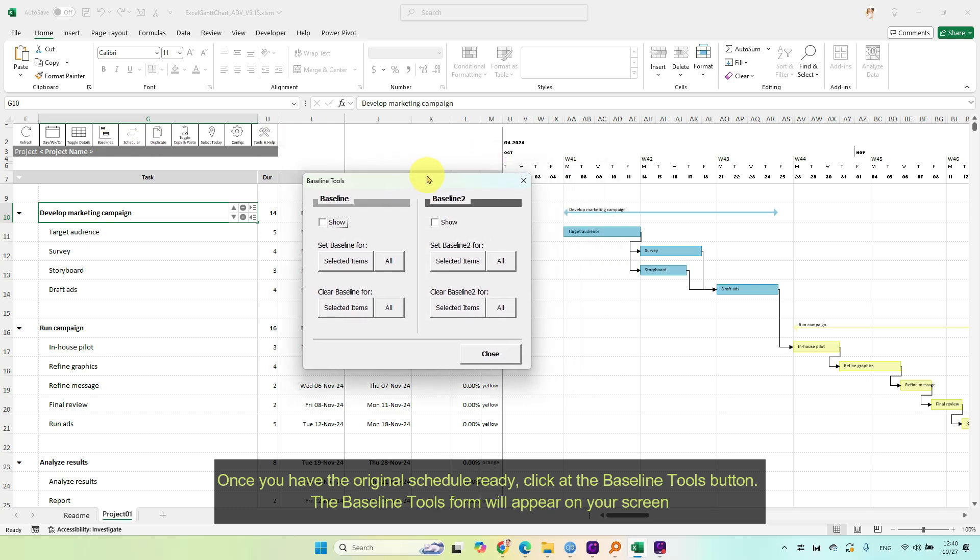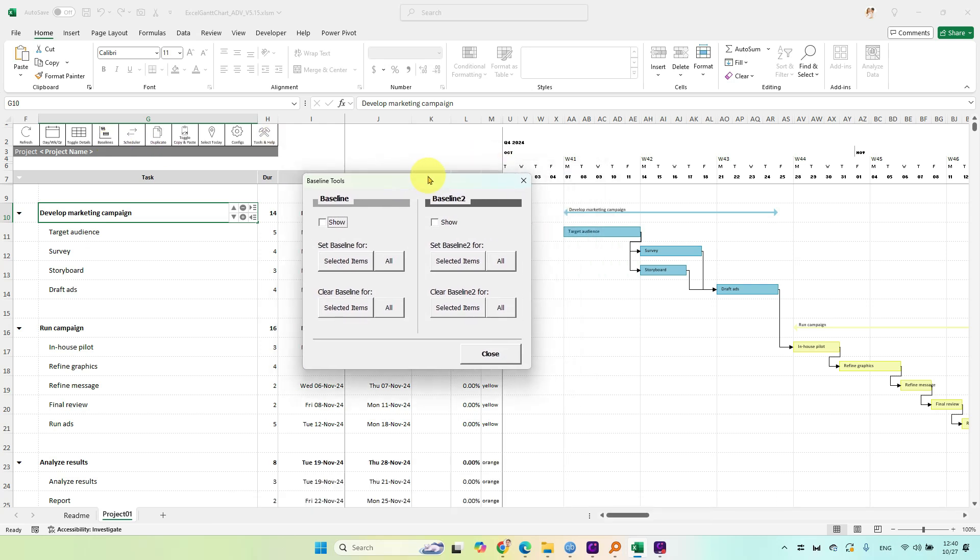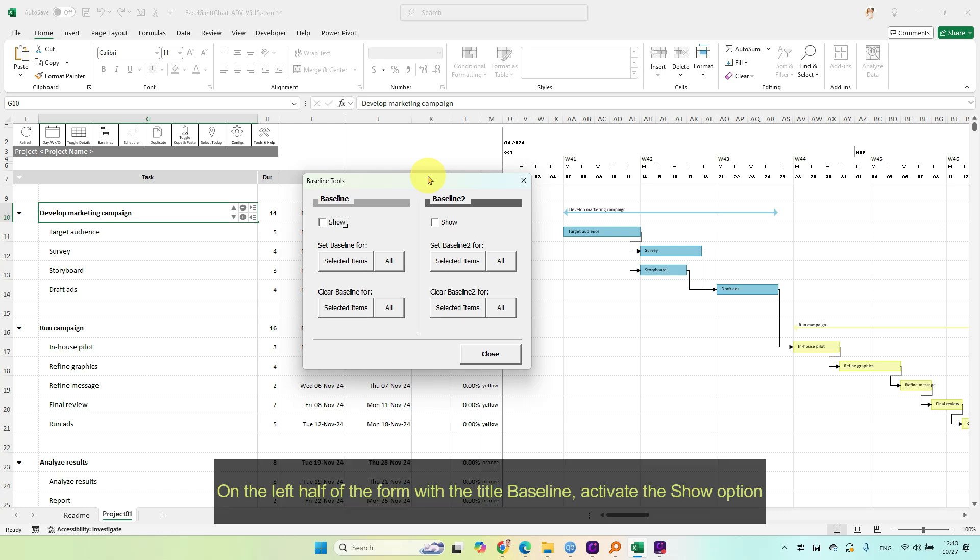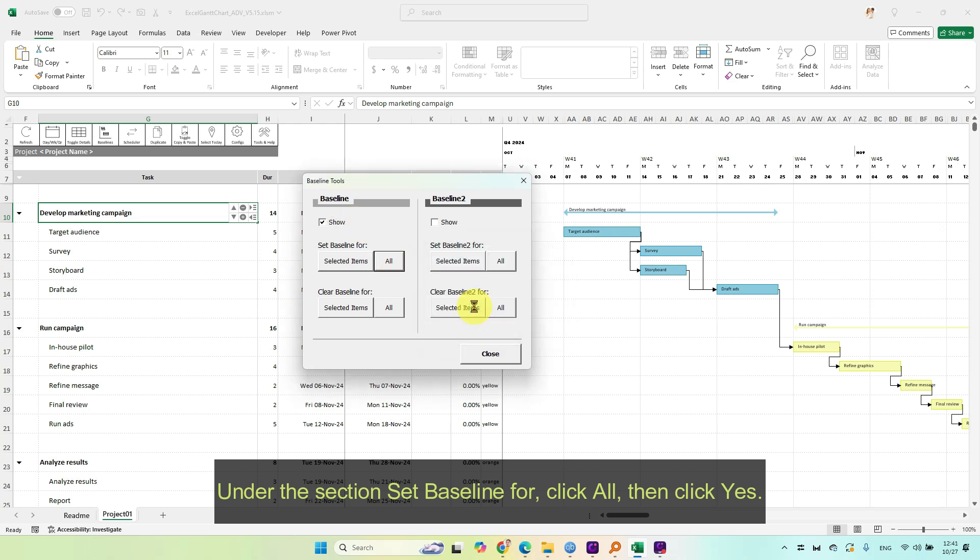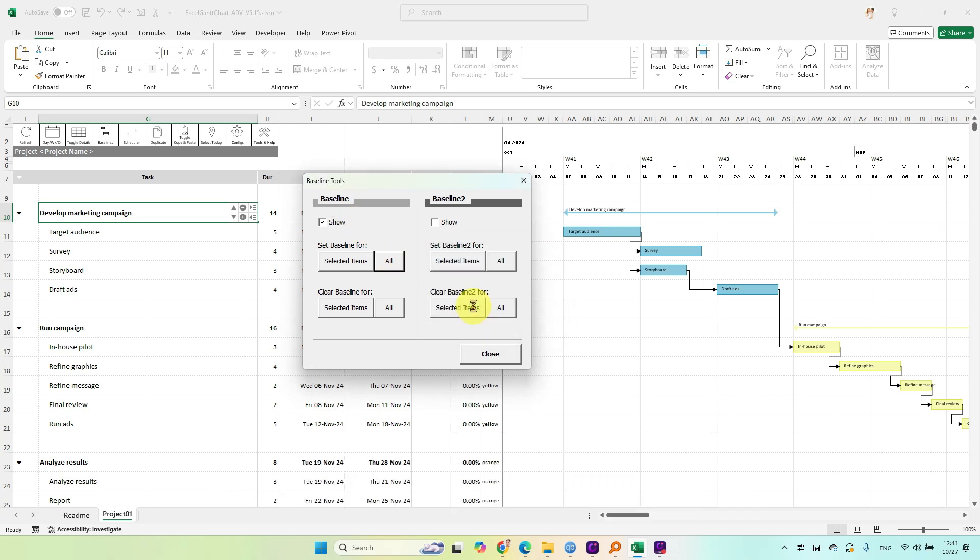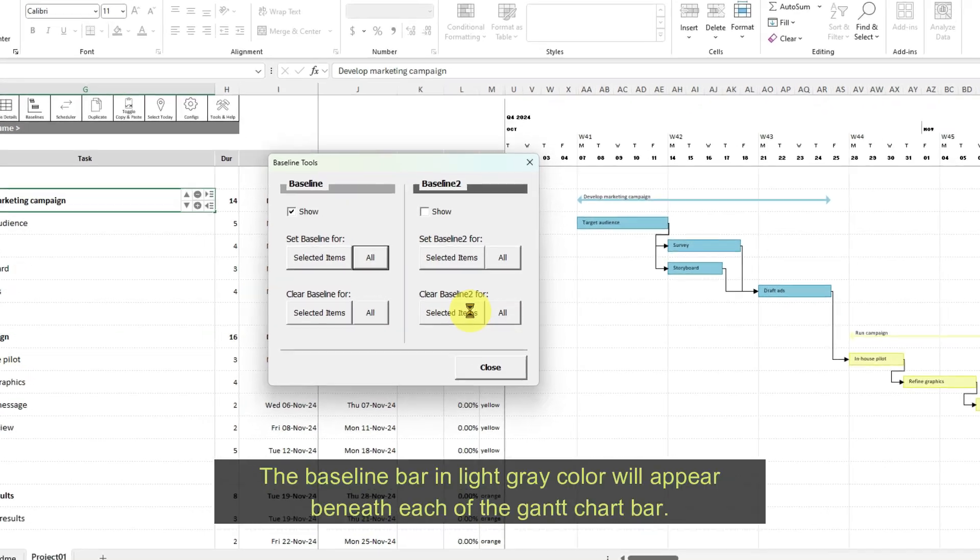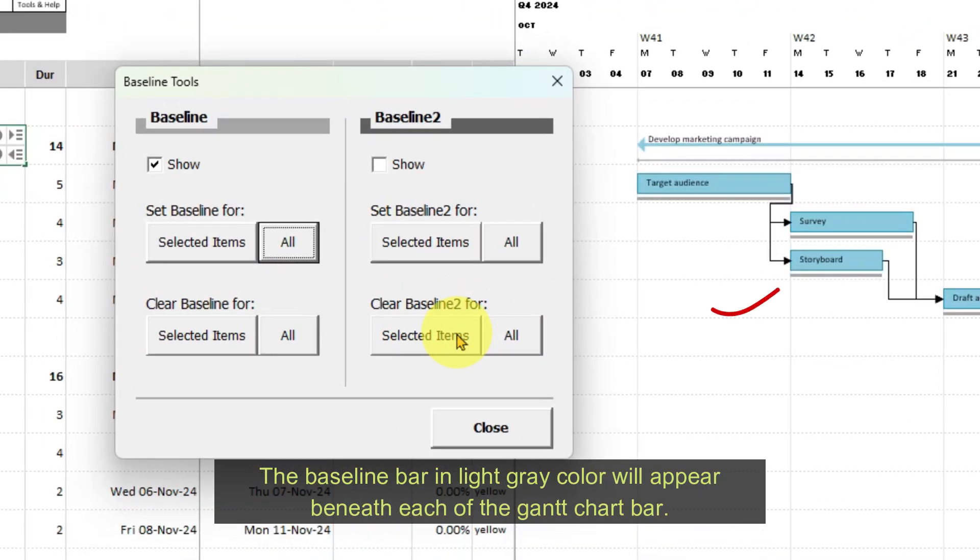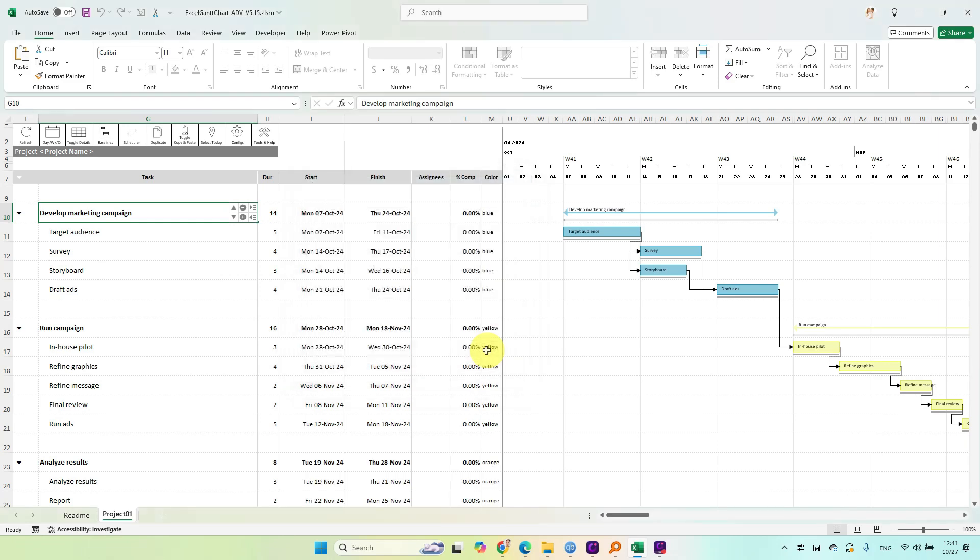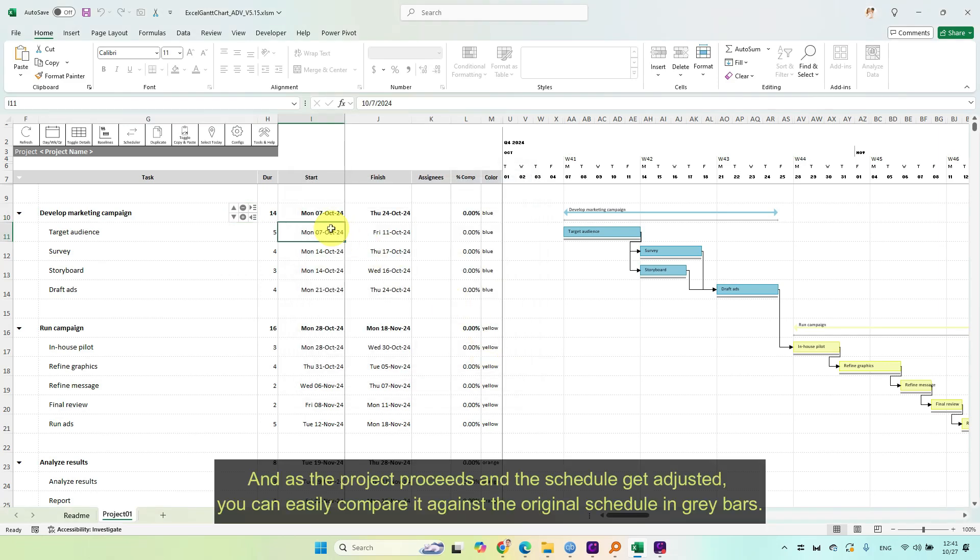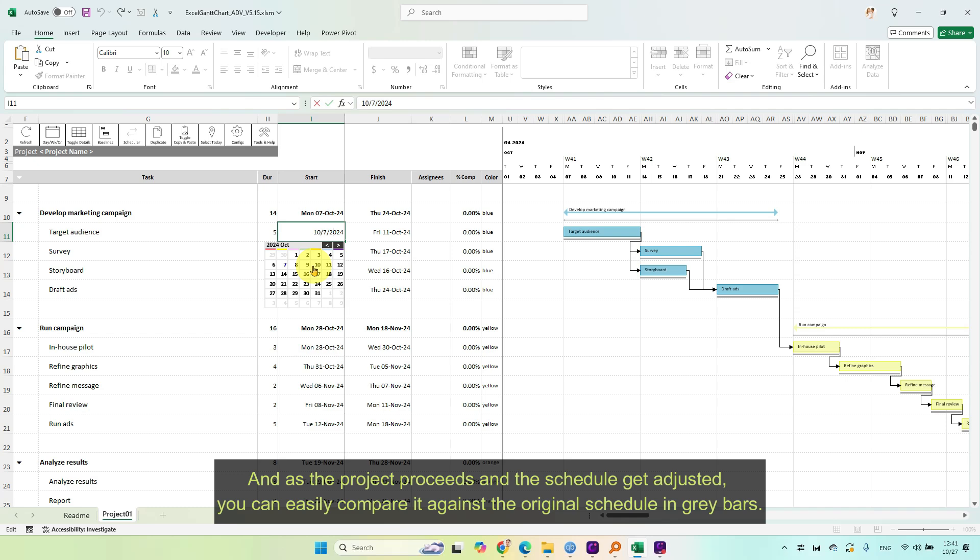The baseline tools form will appear on your screen. On the left half of the form with the title baseline, activate the show option. Under the section set baseline for, click all, then click yes. The baseline bar in light gray color will appear beneath each of the Gantt chart bar. And as the project proceeds and the schedule gets adjusted, you can easily compare it against the original schedule in gray bars.